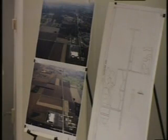And if not, how can we guarantee a 2010 date? That decision is out of my hands. Okay. I can certainly say the fact that the community is that interested plays a role, and I'll certainly reflect those concerns and desires. But the project is so massive from a permitting standpoint and a land use impact standpoint, and from all the necessary discussions and engineering plans that need to be generated, that it's just not feasible to feel comfortable slating a store for a 2009 opening, knowing that I really should be under construction right now in order to guarantee that I can be open in 2009.